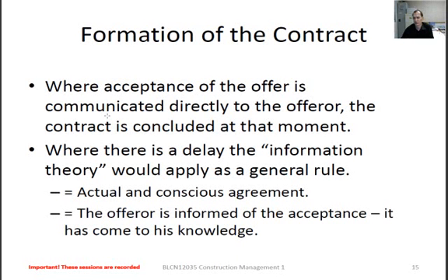Joshua, the postal rule applies. Emails aren't viewed as being legally binding in this country as yet. There's no case law to substantiate that. Excellent, great stuff. Thanks, Carl. That's a real good answer as well. Emails, electronic means not yet recognized. So there we go. Faxes are recognised under case law, but not emails as yet.